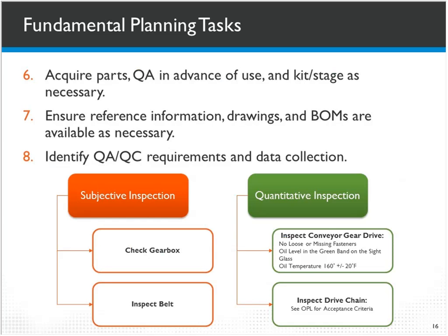And then, of course, it's the other information that the craftsman might need. The BOMs, the bill of materials, will be very critical if they take a machine apart and then they realize, uh-oh, this thing here is broken. Well, if they have a bill of materials, then they know exactly where to go in the warehouse to get them, and the part number, and what shelf it's on maybe.